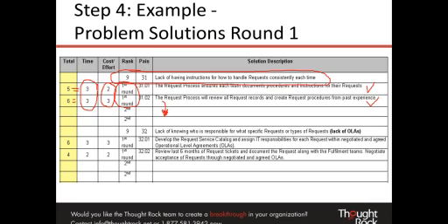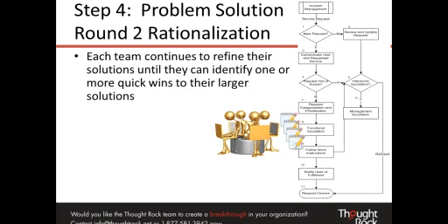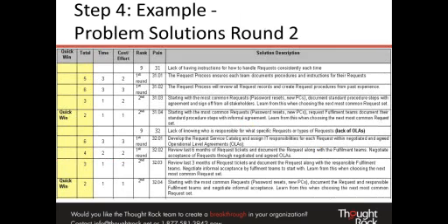So if we go into our next slide, we send everyone back to their brainstorming sessions and teams, and each team continues again. You're giving them instructions: keep on breaking that solution down until you come up with the minimal time factor and the minimal cost and resource effort. So then we'll end up getting down to my solutions list.